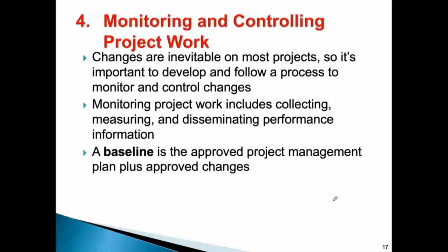especially in integration management, you need to look at variances on the baseline. The baseline is actually the approved project management plan. That will be your baseline, and you will hear me repeating this baseline in each and every knowledge area that you are going to cover, because the baseline is related to the schedule, the scope, the cost, the budget, and the rest of the plans.